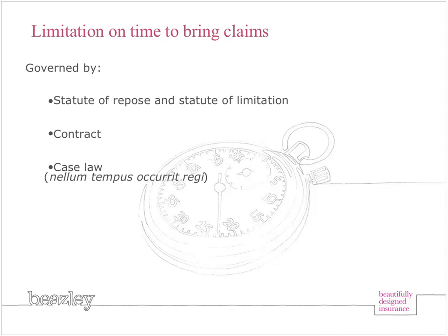With statutes of limitation, the time often starts from when the plaintiff discovers the harm or when they reasonably should have discovered the harm that caused the claim, and that's known as the discovery rule. So it could be that they didn't discover, or it wasn't reasonable for them to discover, the harm for much longer than just the 2 to 4 years.